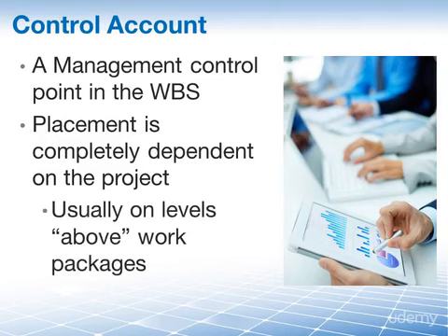Where you place these control accounts is completely dependent on the project. Maybe your WBS lists 10 sub-projects, so a good location for the control account could be on the branch for each of those sub-projects, so that you can report on each of those separately.